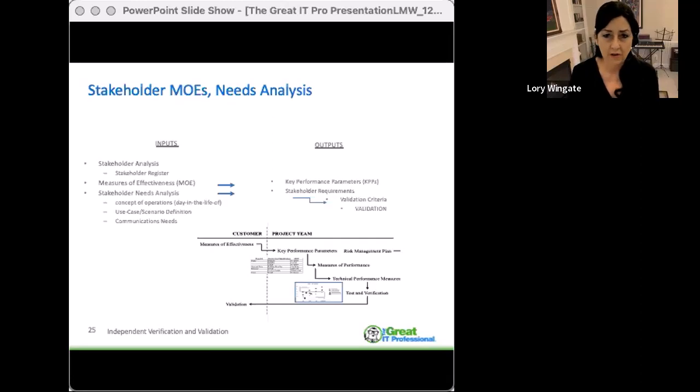You have no control over that. You absolutely cannot control that. So if they're going to grade you, validate the project outcomes using that criteria, you're going to have a problem and you're never going to reach satisfaction. So the more you can hone in on how they are going to grade you, the better it's going to be for you and the more success you're going to achieve out of that project.